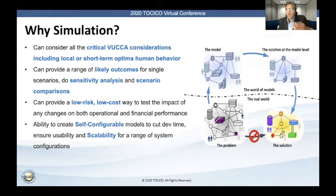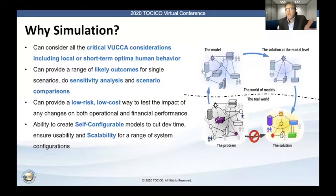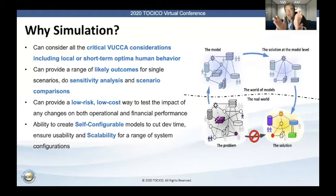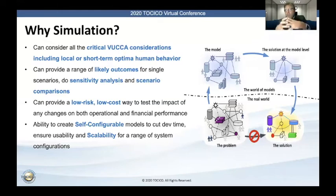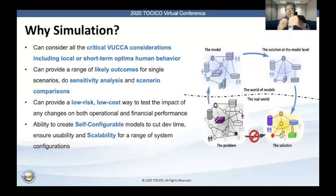The second part is that when we are using simulation, we can run it in a number of different ways. We can run it as a single scenario with multiple replications to see the range of outcomes — almost like a forecast for a typhoon or hurricane, with that funnel effect showing that the closer in time, the more narrow the distribution of possible outcomes, and the further ahead, the wider that range. With a simulation model, if you can specify the minimum, maximum likely, and maximum duration of specific tasks, and you have a huge pipeline of programs and project phases, we can run multiple replications and see best case, worst case, and likely case.